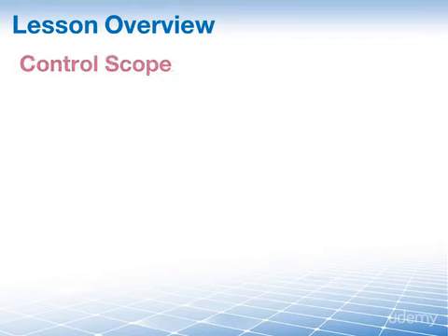One of the biggest issues on every project is your project scope and controlling scope creep. Scope creep can lead to project failure, or at a minimum be very costly and delay your project schedule. To avoid scope creep, you need to readily identify variances from your scope baseline and control all the required changes to your scope. This is exactly what the control scope process will allow you to do.